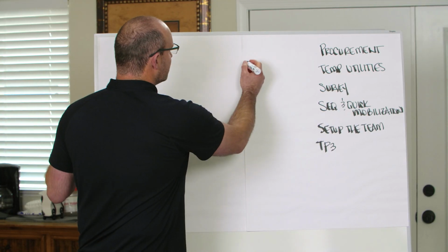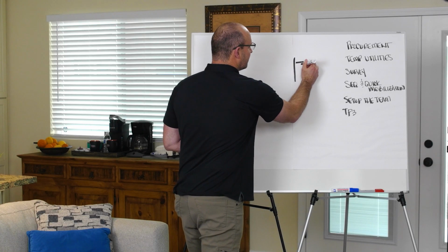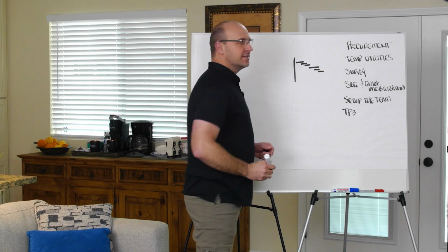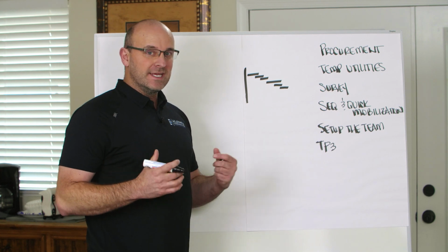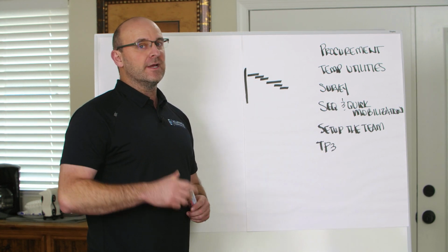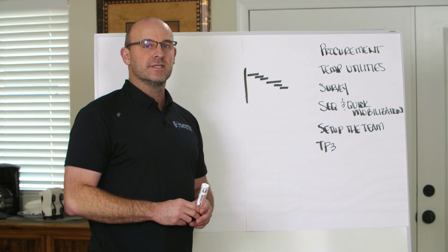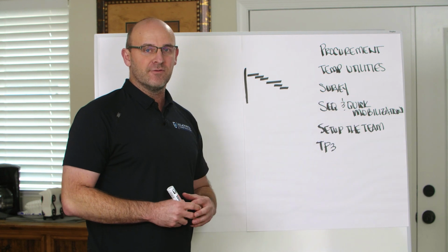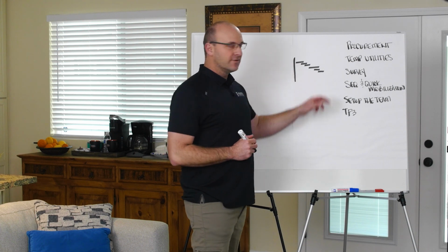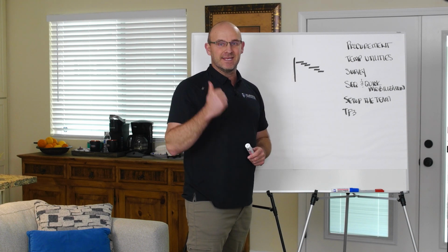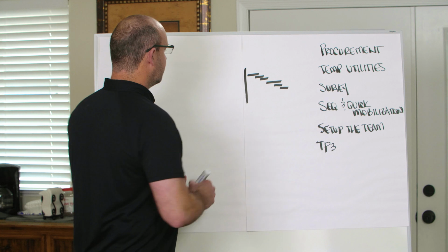Okay, so first and foremost, let's say that this right here is your start date on your project. You really want to get these first mobilization, foundations, excavation activities really going well. And you want to come out of the gate really hitting it hard, really going fast. Now, you know me, I'm not a pusher, I'm a driver, but if we want to drive 80 miles an hour, at the beginning of the project is the time to do it. Later on in the project, when you have 40 different trade partners, it's hard to speed up or slow down without massive consequences. But when you have a couple of trades here at the beginning, we must get out of the gate fast.